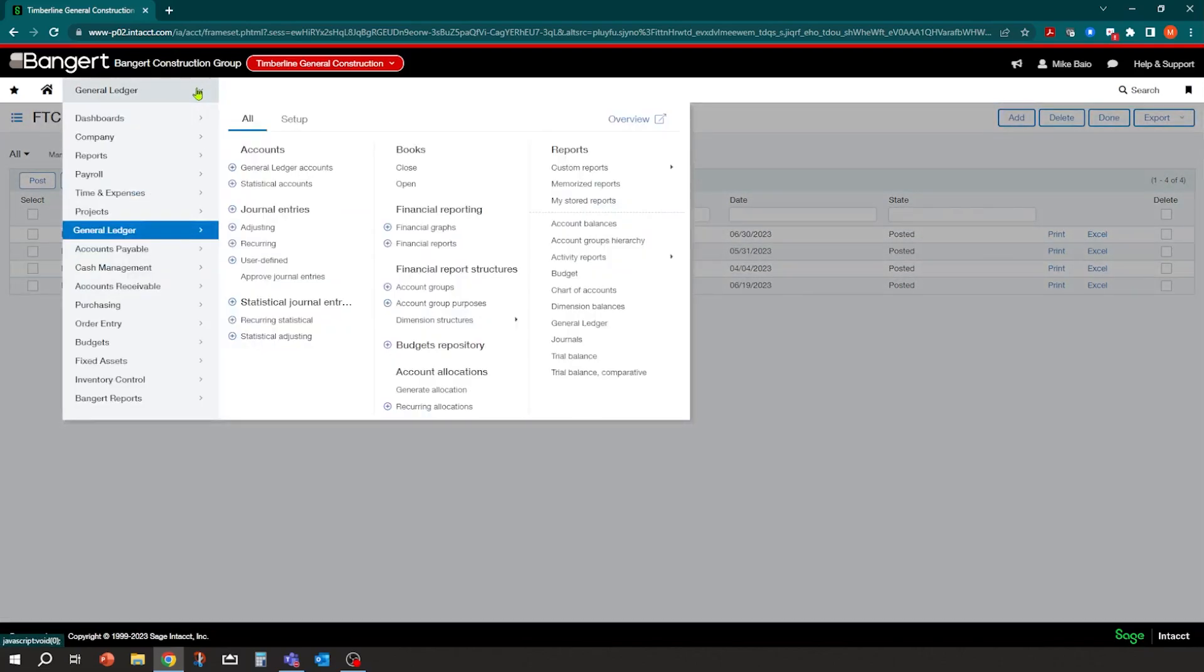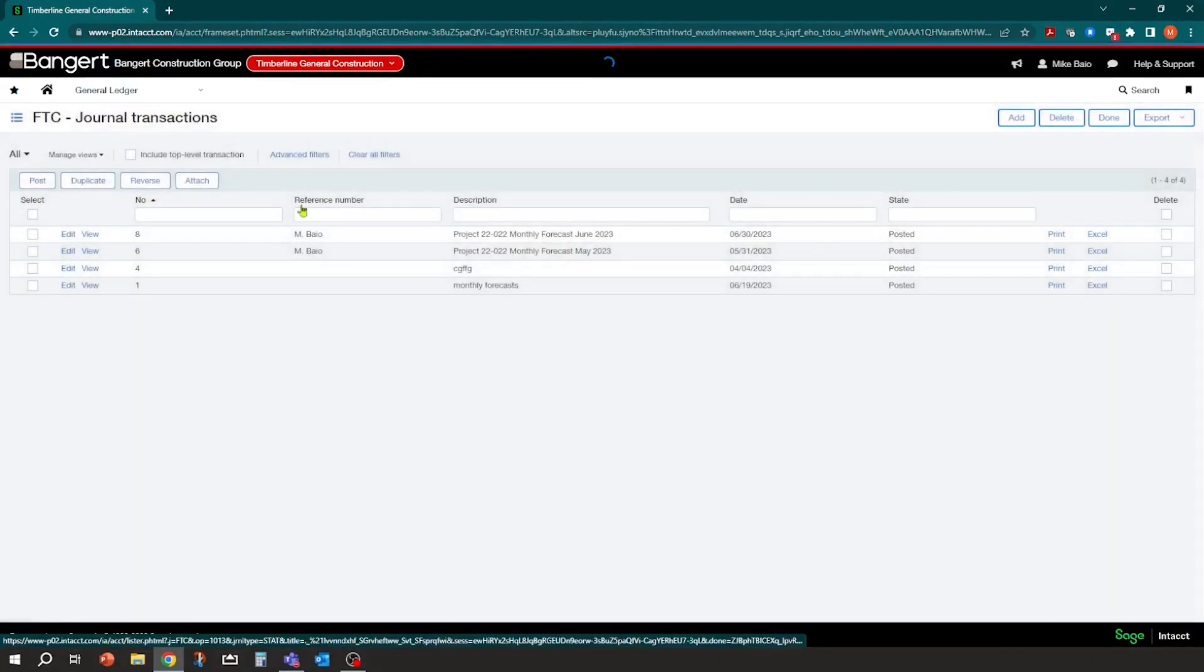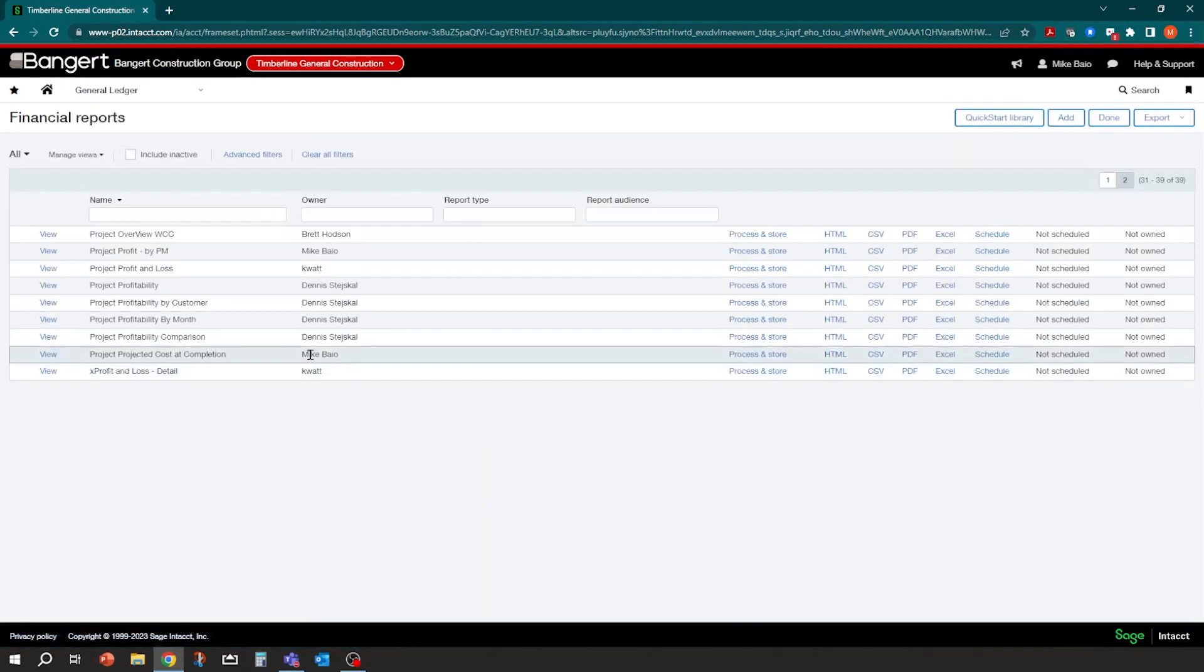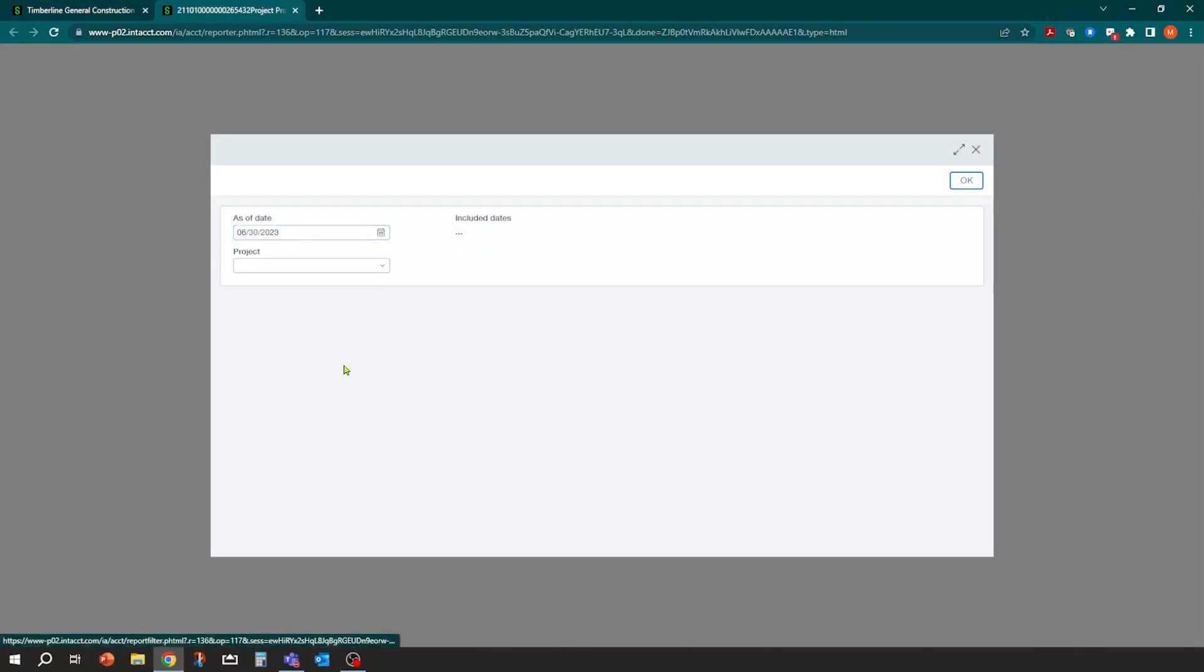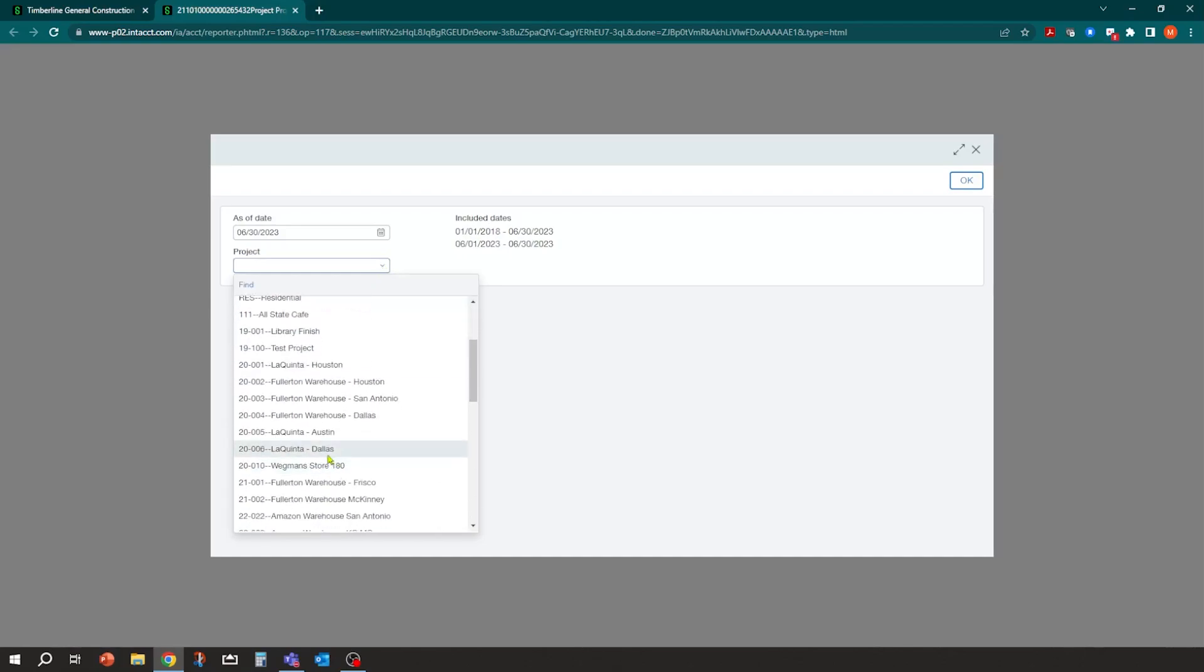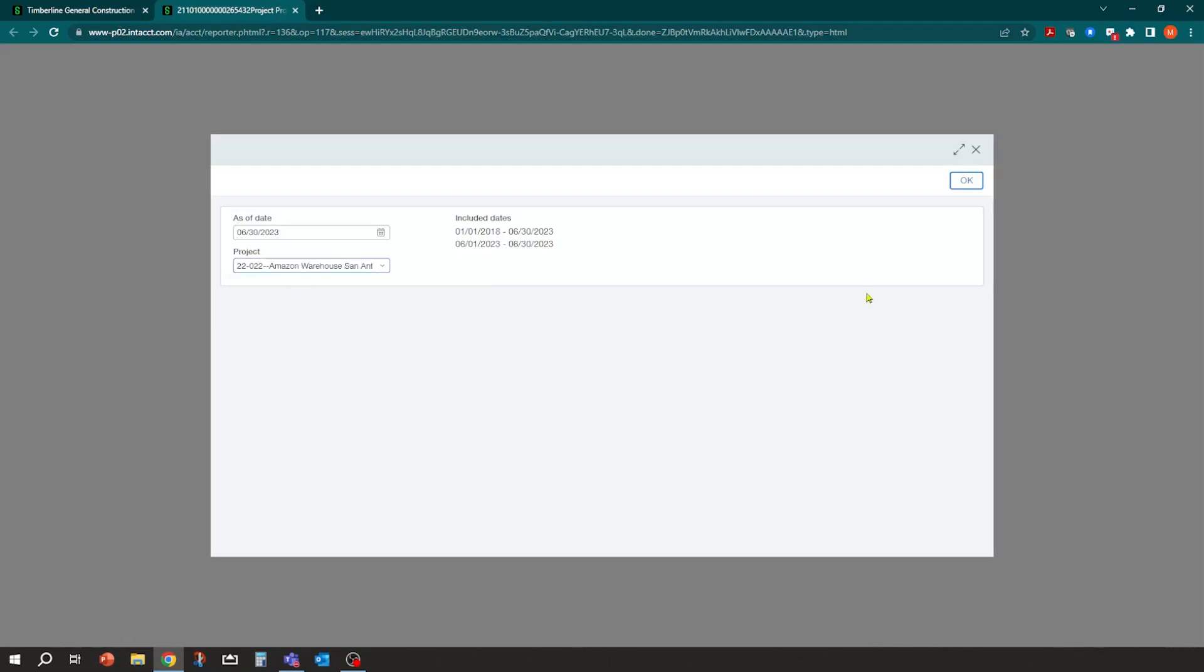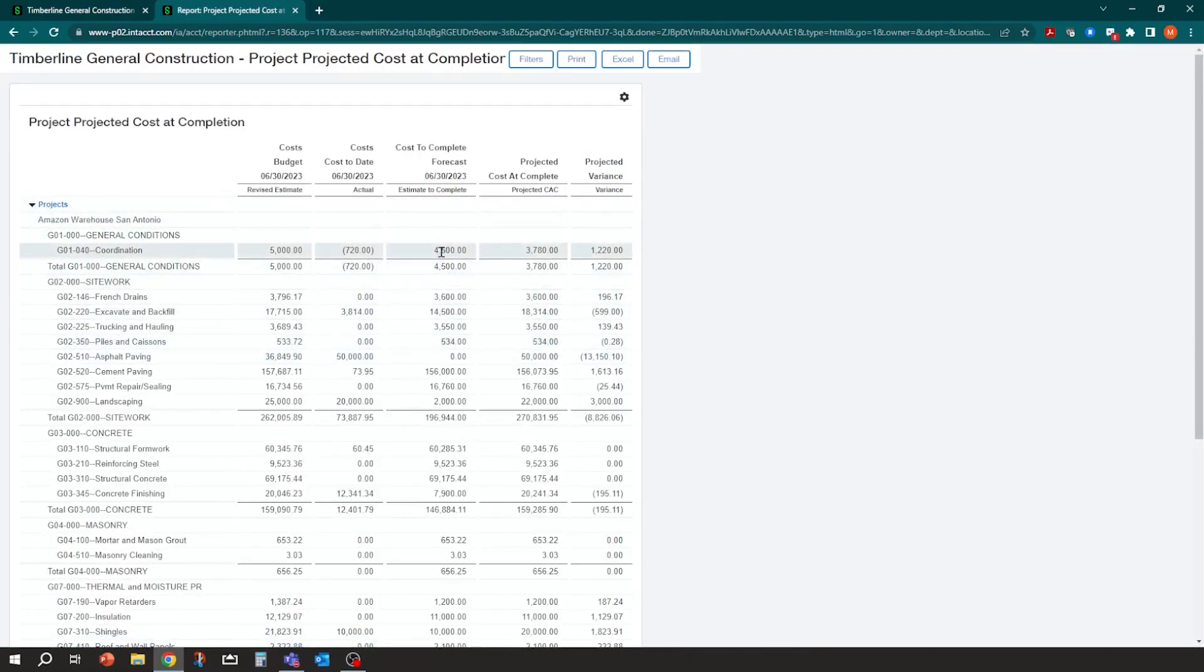And if I go rerun that report now under financial reports. My projected cost at completion, I can run it as an HTML. Date range. And I can use just today's date, or I can just go to the end of the month. And I can pick the project I want. Amazon warehouse. Click OK. And now it's showing me as of 630, there's my cost to complete. We have some formulas in here that says, OK, for projected cost at complete, take your actual cost plus your cost to complete and give us a cost, protected cost at completion, and then run a variance off of your budget.